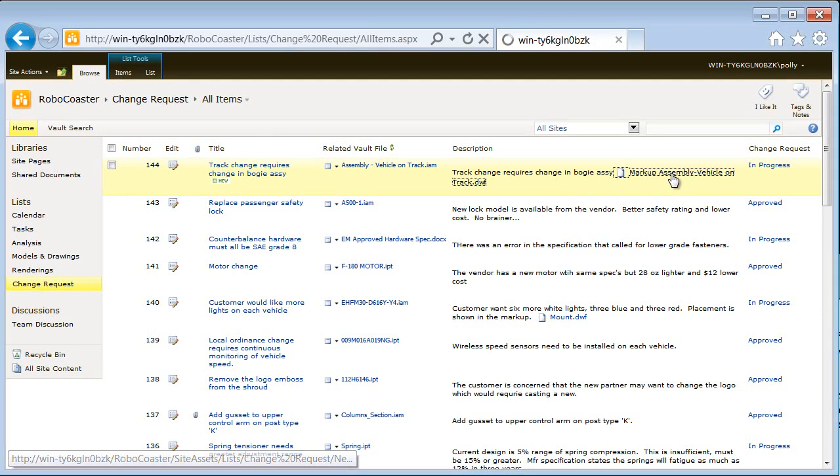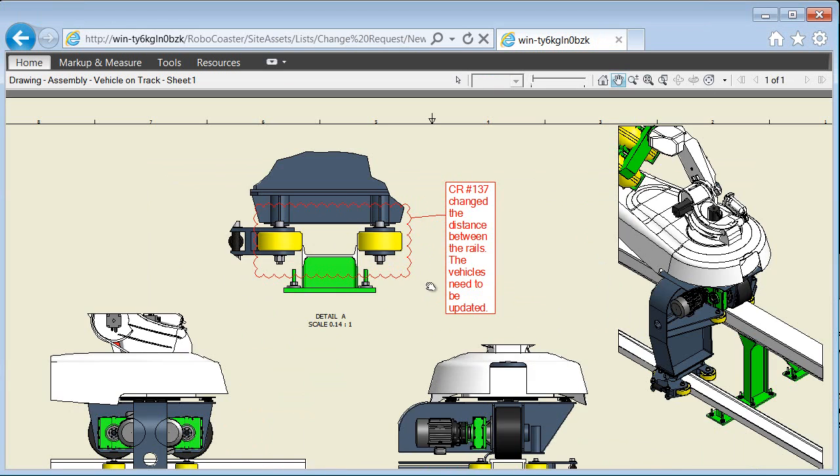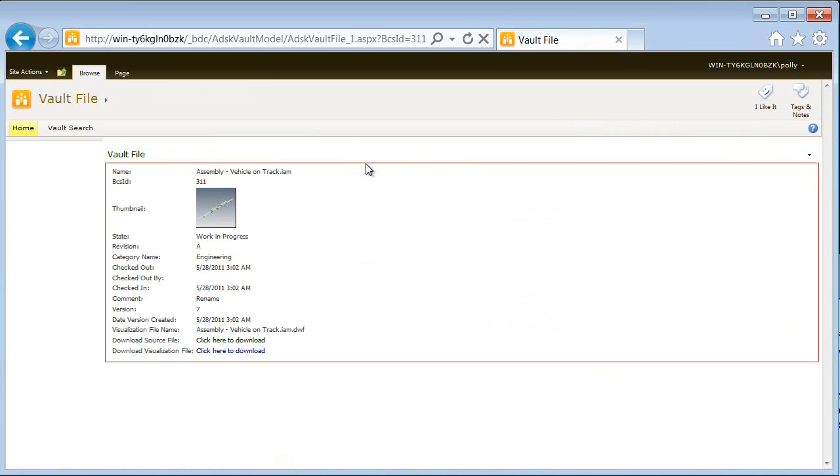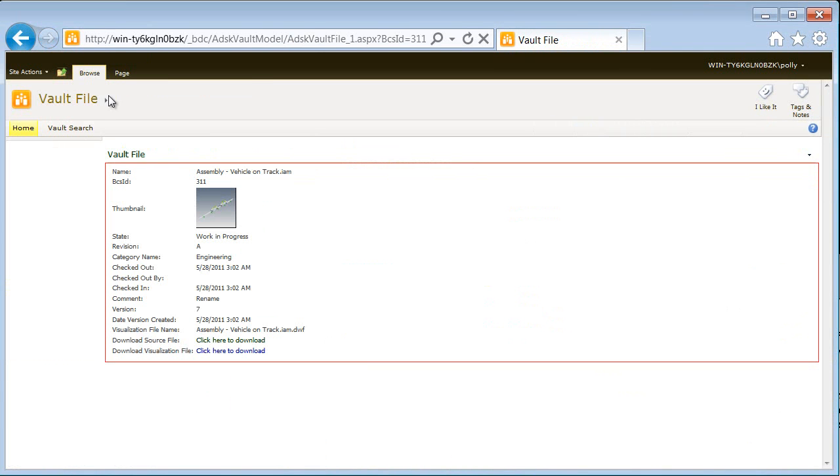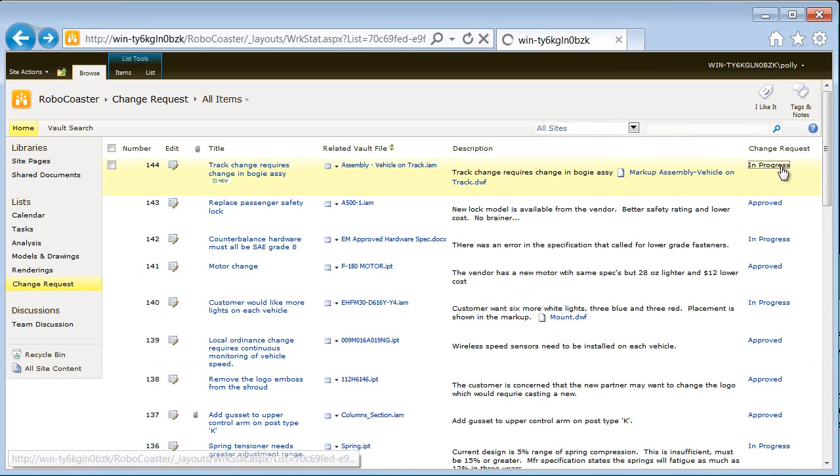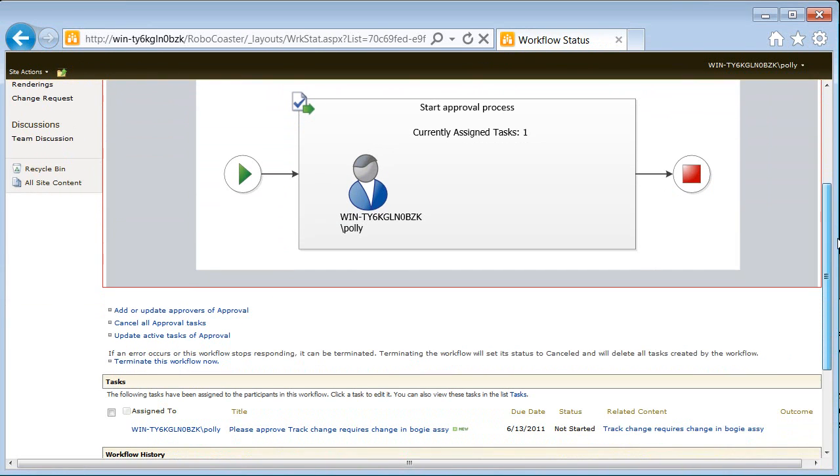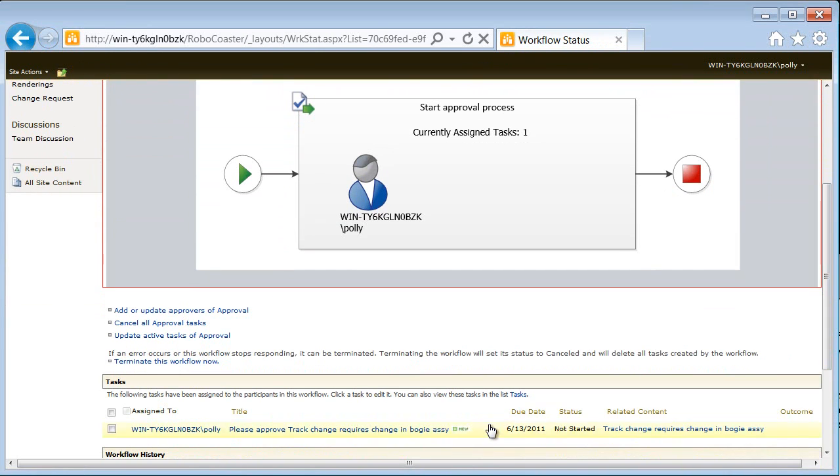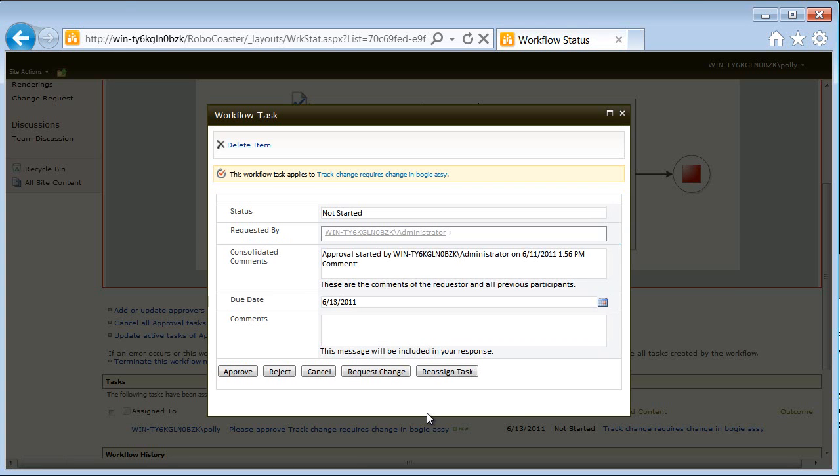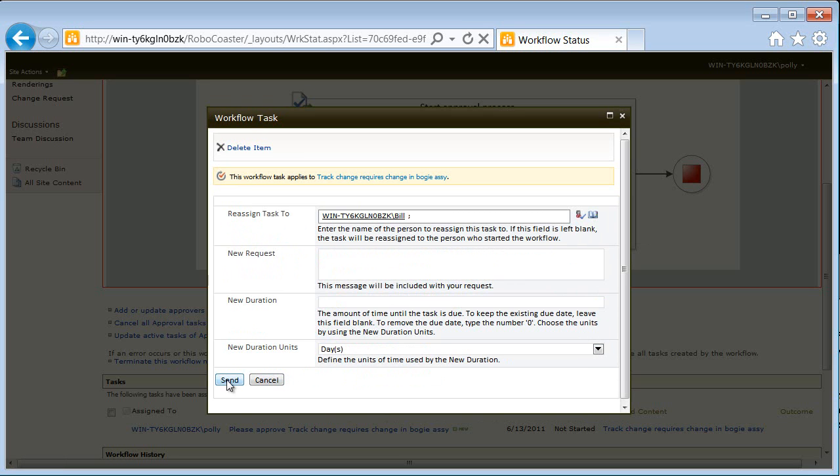The program manager receives an email indicating that the new change request is pending review. The change request is reviewed, verifying that the attached markup contains sufficient detail and that the correct model is linked from Vault. Comments are added and the change request is assigned to the appropriate person.